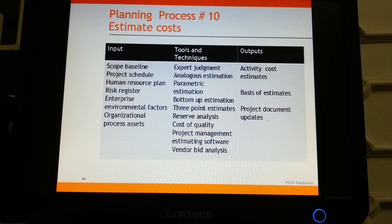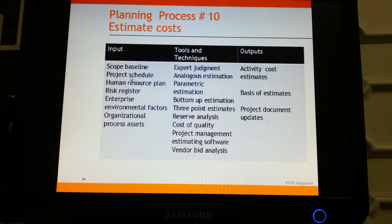Let us discuss estimating cost. At this stage, the inputs include the scope baseline, the project schedule, the human resource plan, the risk register, the enterprise environmental factors, and the organizational process assets.